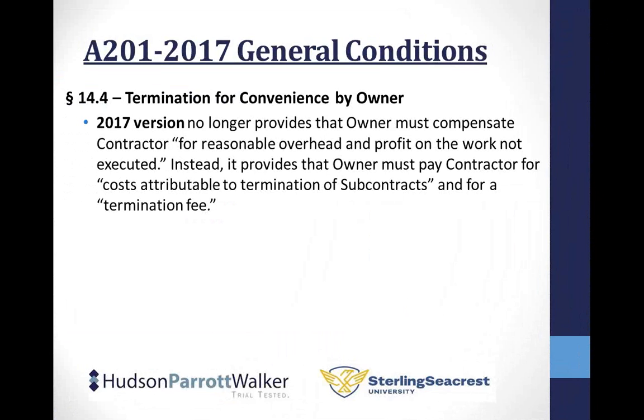And if you get terminated for convenience, and there are certain retailers out there that I've seen this a lot, where they, for whatever reason, they'll enter into contracts. The contractor completely gears up, operates for a month or two, and they say, we've revisited our plan, and they terminate for convenience. And there are substantial costs associated with termination for convenience when you have that.